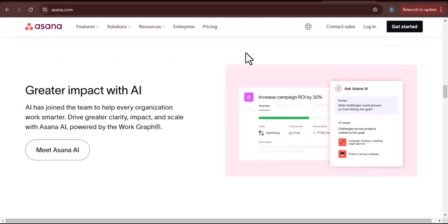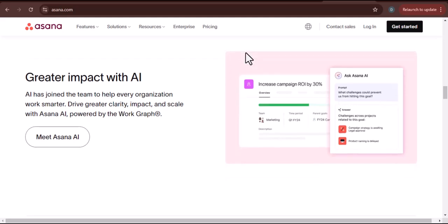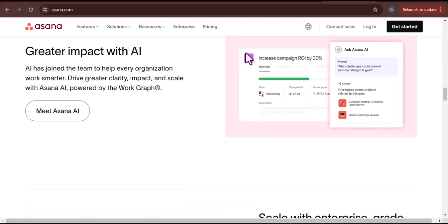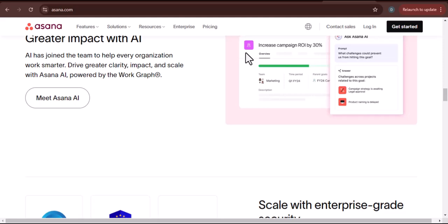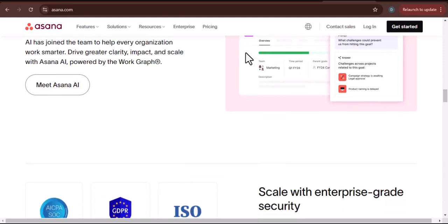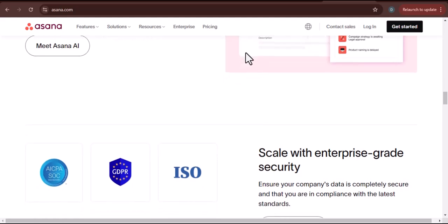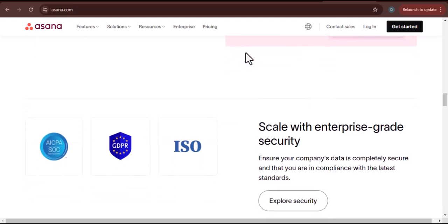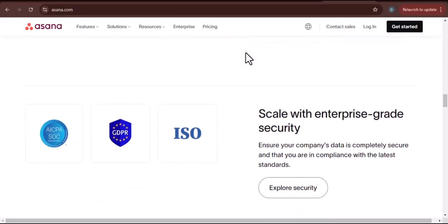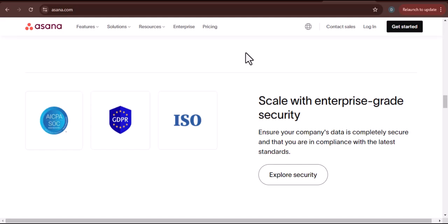Take a moment to assess your current Asana setup. What projects are active? Which ones are archived? What tasks are essential? Which are, let's be honest, just clutter? This is your opportunity to declutter your project management life. Create a spreadsheet, yes, a good old-fashioned spreadsheet, to map out your Asana projects and tasks. List the project names, task names, assignees, due dates, and any relevant notes. This will be your migration blueprint.